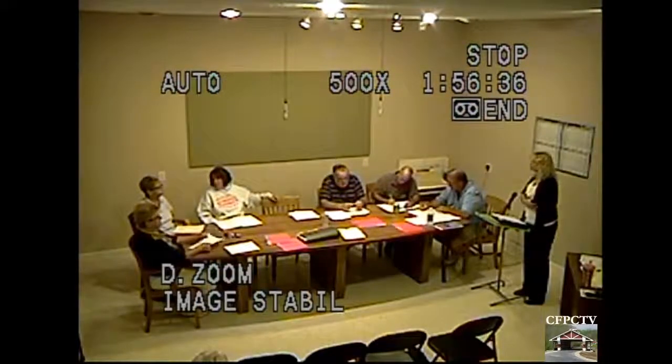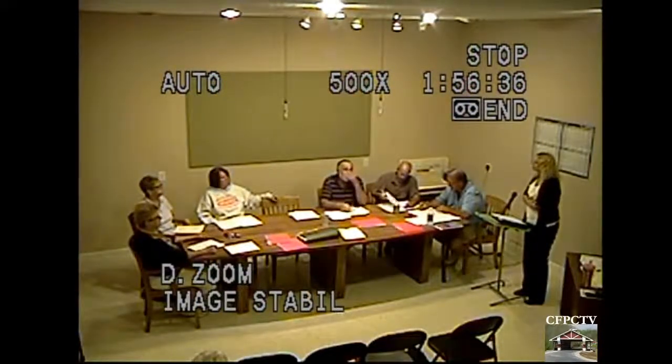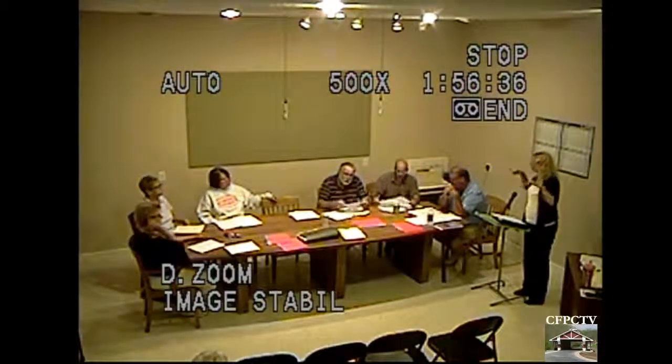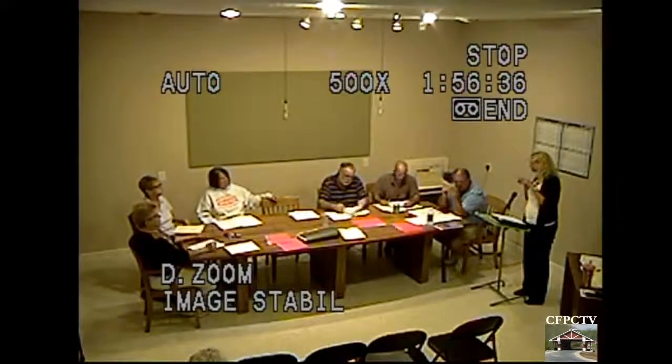Bob Spittler from Wagner Paving was here today. Looked at Shady Lane, and he looked at Lincoln. We're probably going to recommend what's called an edge mill, which is where they basically come in and mill the edge off where the gutter plate is, and then we won't mill the middle because there's next to no asphalt there anyway. There's only about 2 to 3 inches, so you're going to basically be milling into your base anyway.